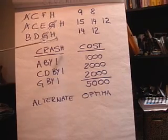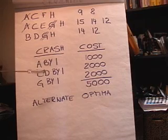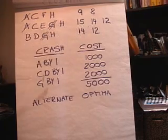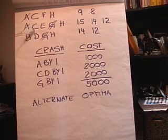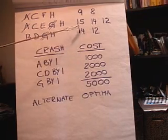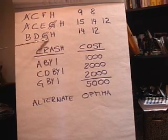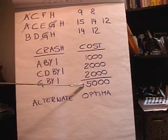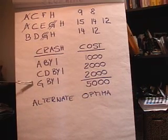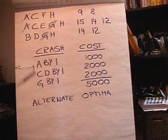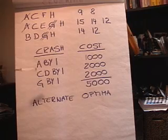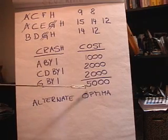This is an alternate optimal problem, meaning there is more than one way to reach an optimal solution. One possible solution: crash A by 1 at $1,000 to go from 15 to 14, then crash C and D each by 1 at $1,000 each (total $2,000) to bring both paths from 14 to 13, then crash G by 1 at a total cost of $5,000. There may be other solutions as well. What we're trying to do is reduce the time of completing the project but do it at a minimum total extra cost.